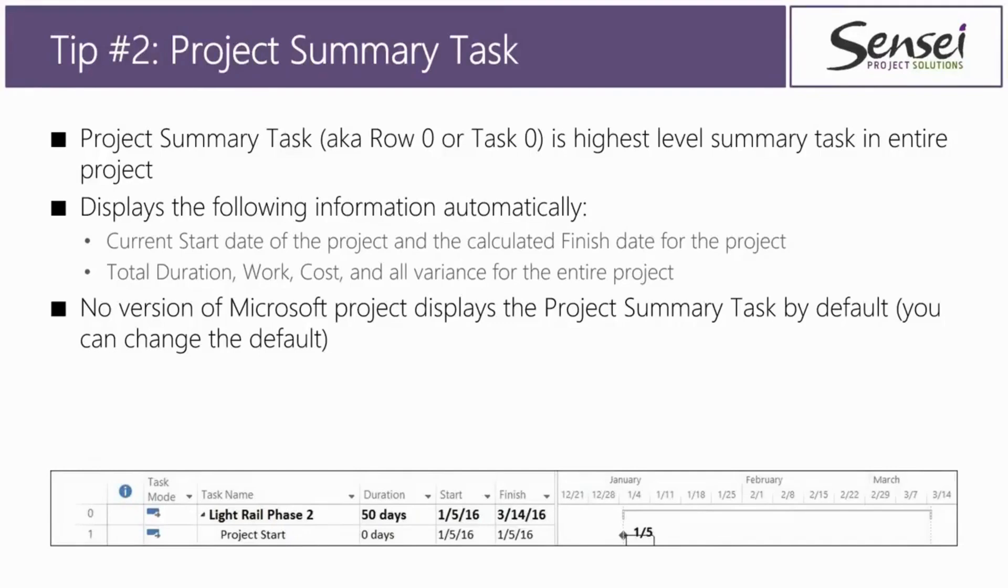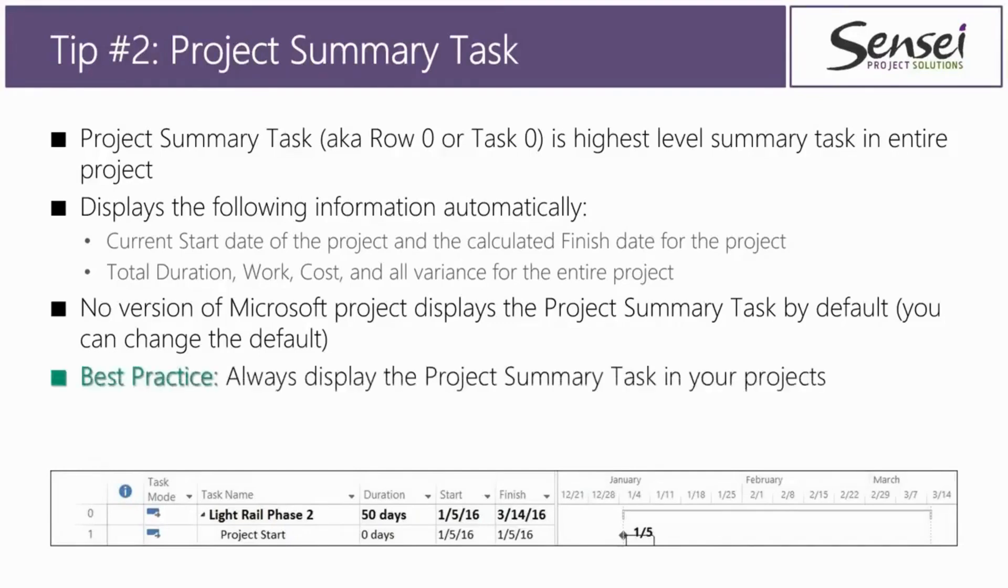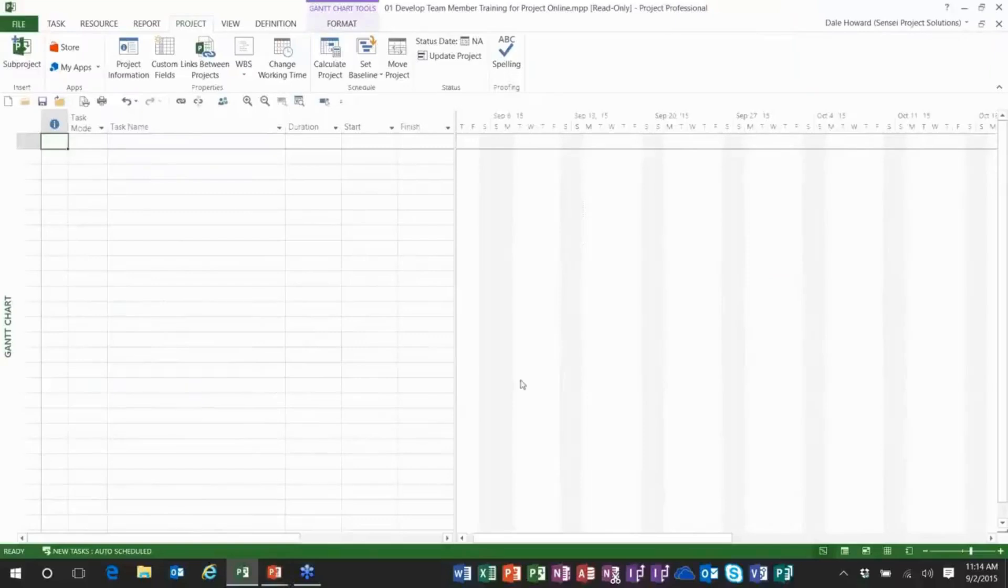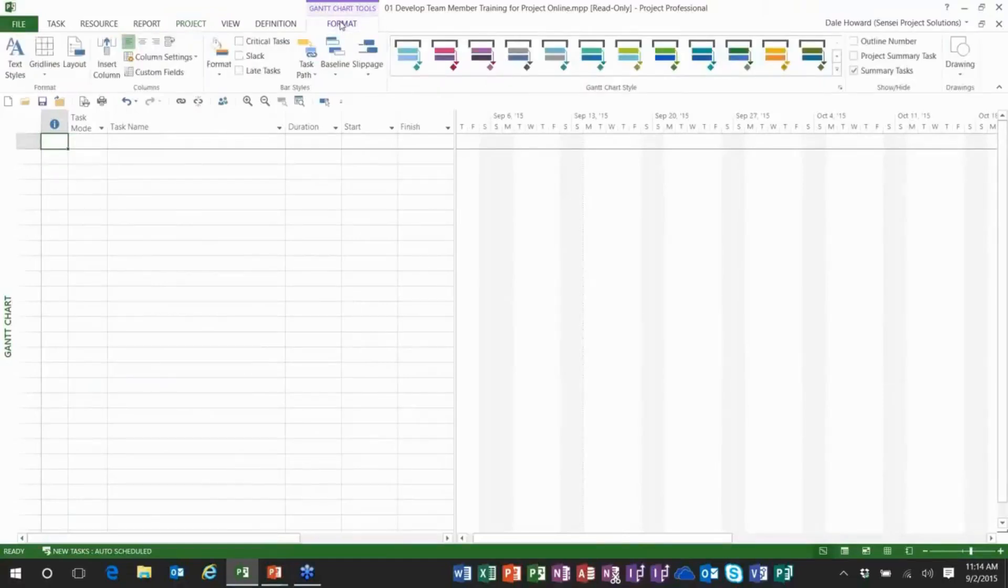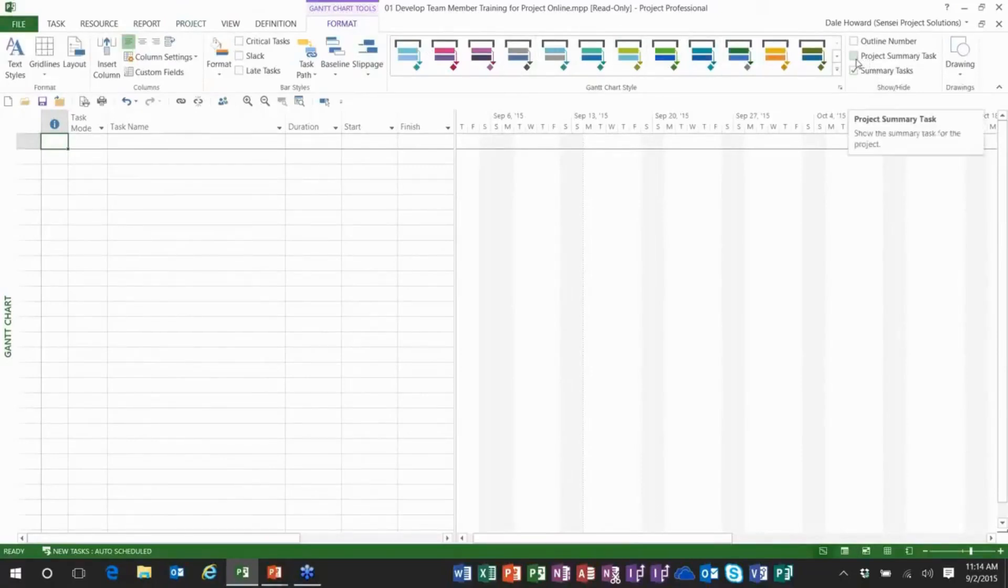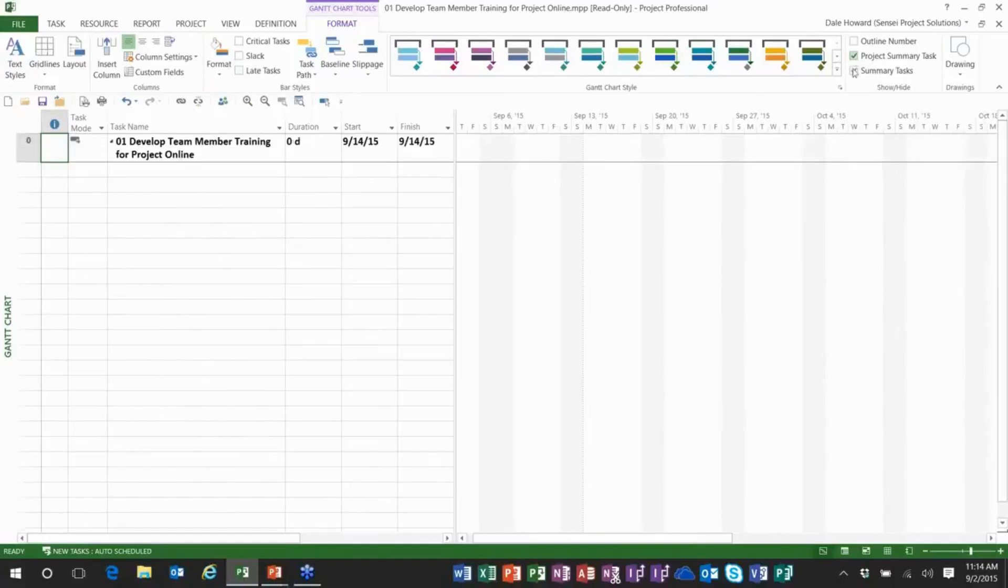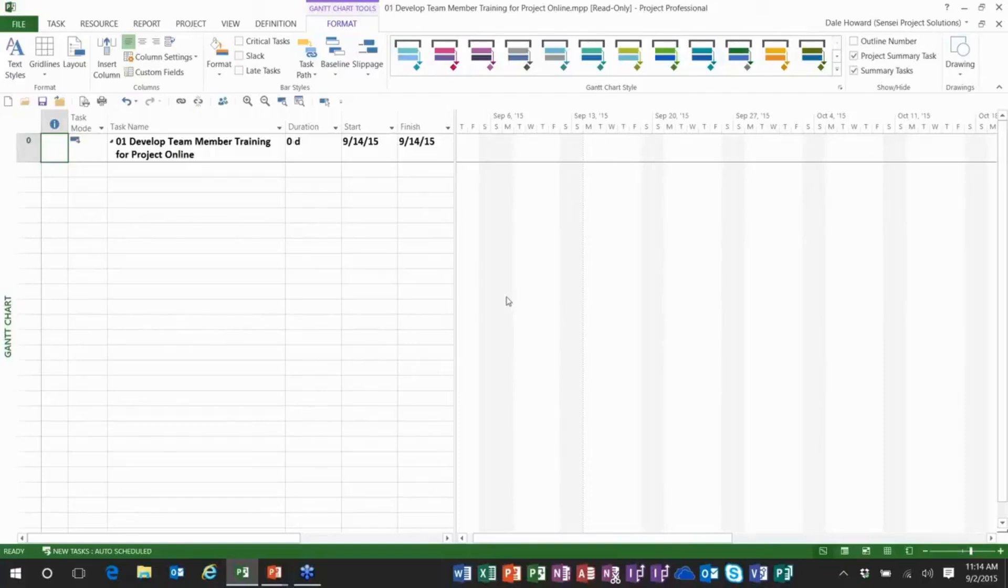But you can change the default setting. So my recommended best practice is that you always display the project summary task in all of your projects. Now, it isn't hard, folks, to display the project summary task. Let's see how many clicks it's going to take me here. I click the format tab to display the format ribbon. There's one click. And I go over to the far right end where I'll find a check box called project summary task. I click it. Hey, there's two clicks. And that displays the project summary task for us.